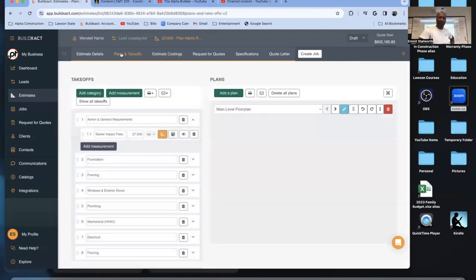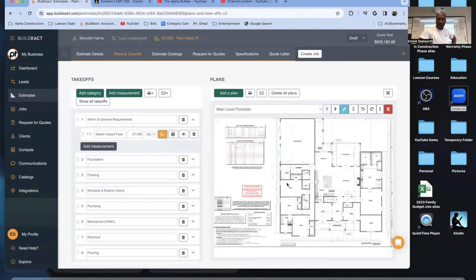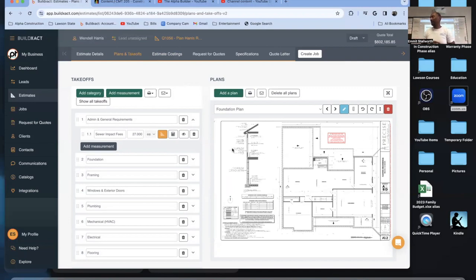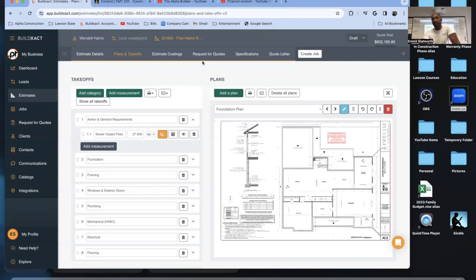Once you upload a new set of plans and highlight the areas we're going to use, it'll change those numbers — but the costs stay the same. One important warning though: don't get complacent with those numbers. If you did a deck this year and do another one next year, you need to adjust for inflation. Always go back to Lowe's, Home Depot, wherever you get supplies, and make sure you have updated, current costs.